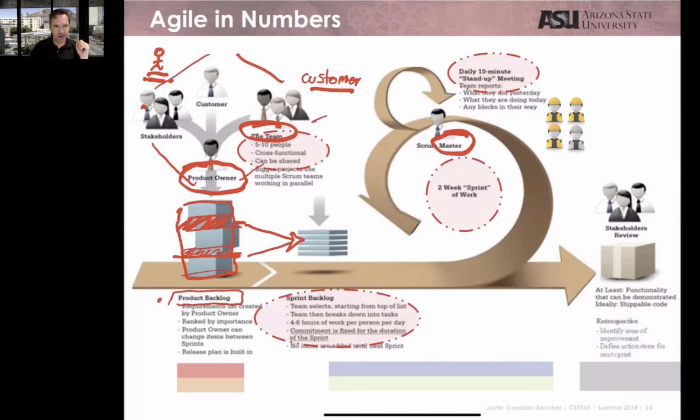Once you select those, the next step is to put those user stories in a particular place, and this particular collection, this particular list is going to receive another fancy name, and it's going to be your sprint backlog. Did you notice? I have this product backlog that is the list of all the requirements that I know for the project.